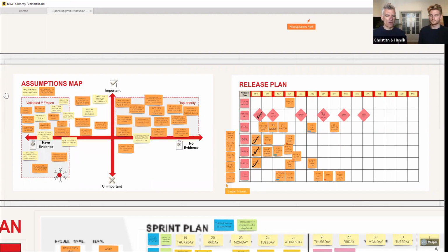So our product backlog is constituted by top priority assumptions that you can see here around needs and etc. And then it's the upcoming important stuff or long lead items in the release plans that we need to act on. So the way it works, backlog refinement, is actually that the product owner starts moving assumptions or requirements in the top priority corner, what we call leap of faith assumption.